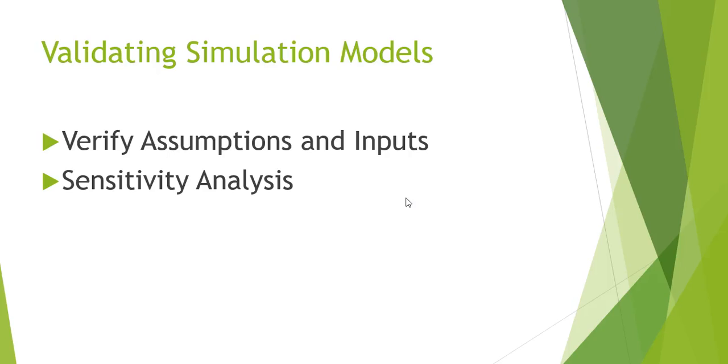And what you really need to do, when you set up a model, is test it against real data and make sure that that model, when you input data from actual work, gives you an answer that replicates the answer for doing the real work. And if you can do that, you're going to have a fairly accurate model. You're going to be able, again, to spend a lot more of your time making management decisions as opposed to calculating numbers and not being able to test them.